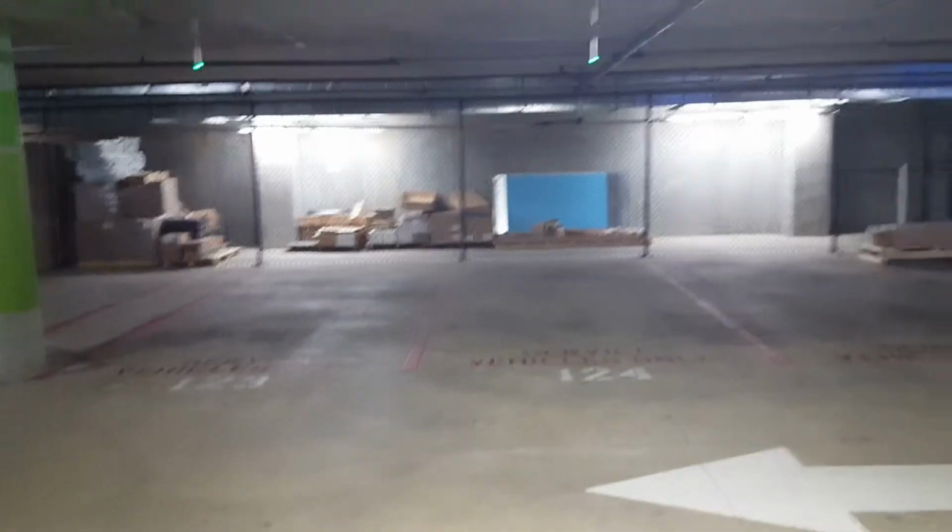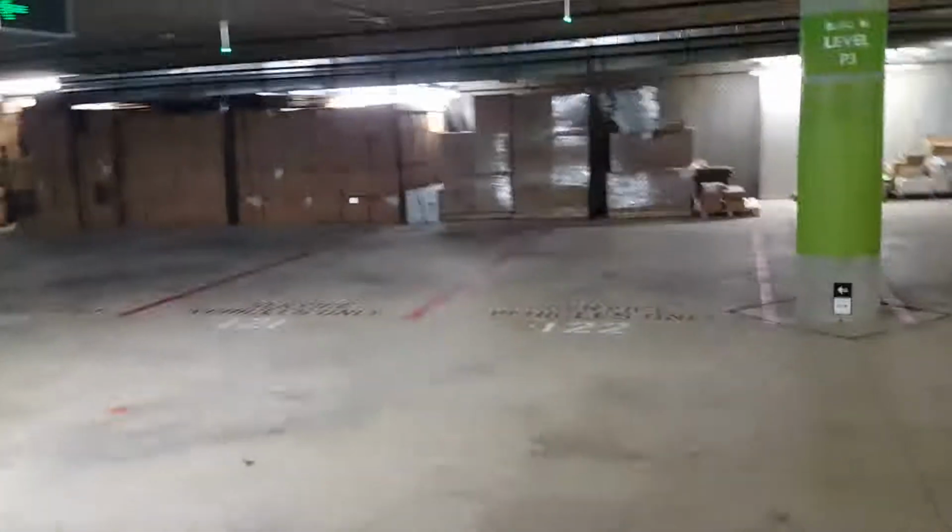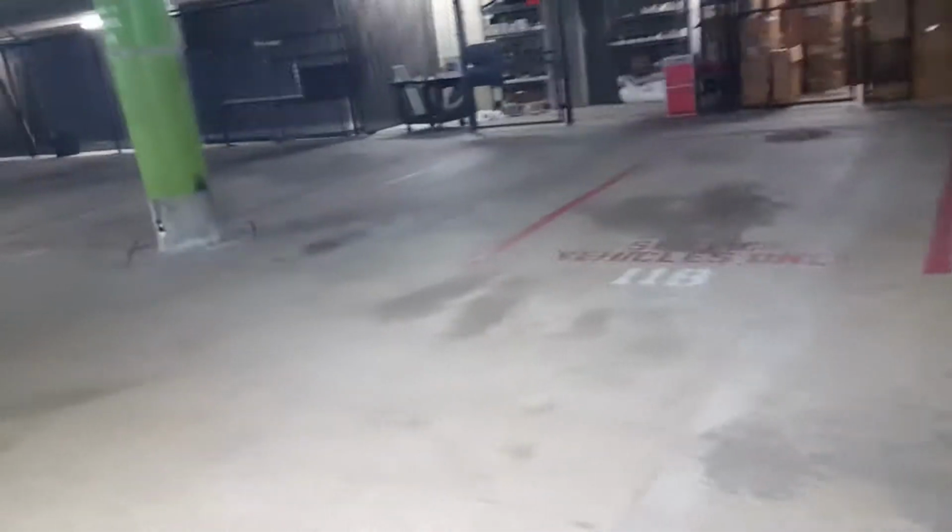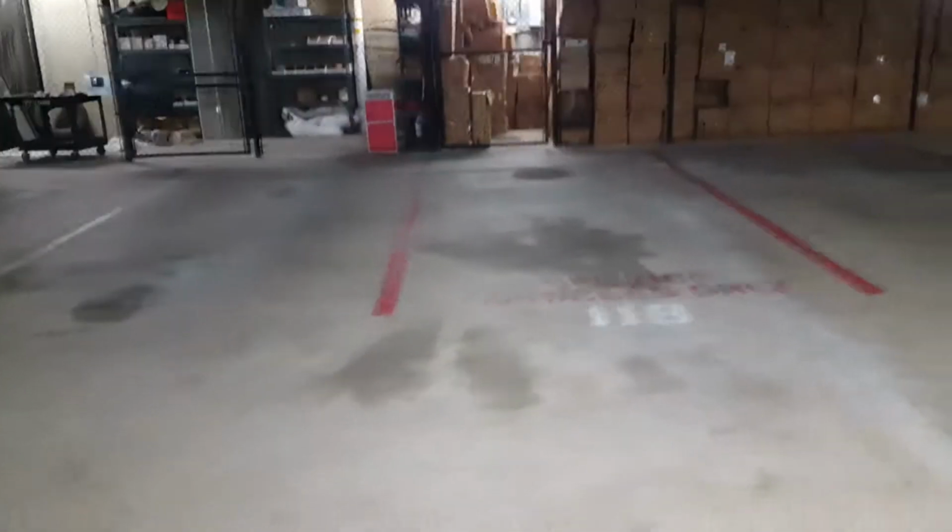Other than that, well, let me do a quick measurement. Hold on. Okay, I just did a measurement on those stalls, and they're 9 foot wide, so we won't have to do any adjustments on the layout for stall striping. We would put them back in white: take out the red, put it back in white.